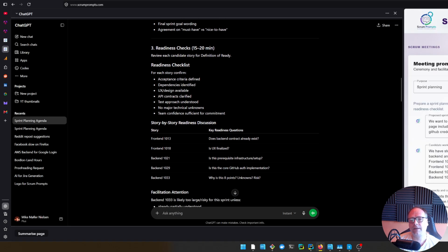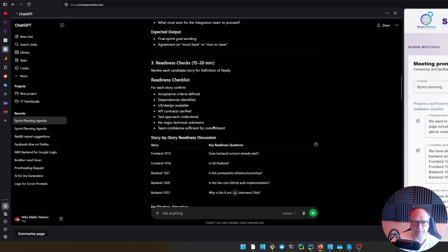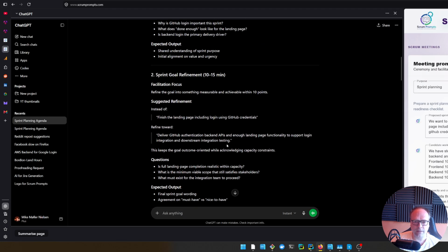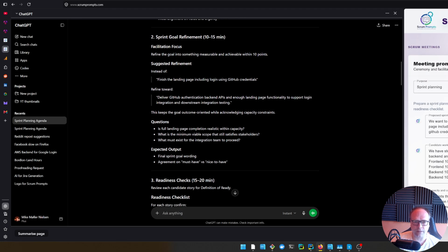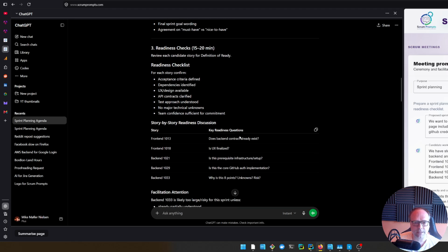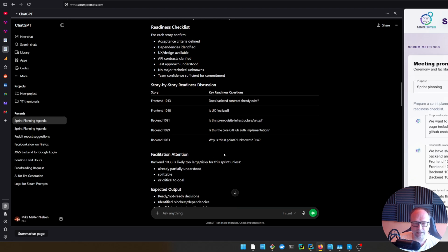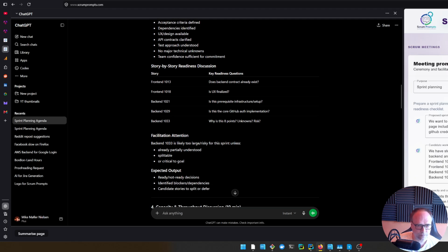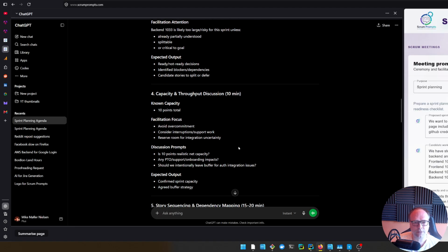So that means that now suddenly you have a structured sprint planning meeting, and in the sprint planning meeting you can take in the JIRAs and the stories that actually make sense for the sprint. Everybody commits to a sprint goal and commits that the sprint contains these stories right here, and then you can start your sprint after that.